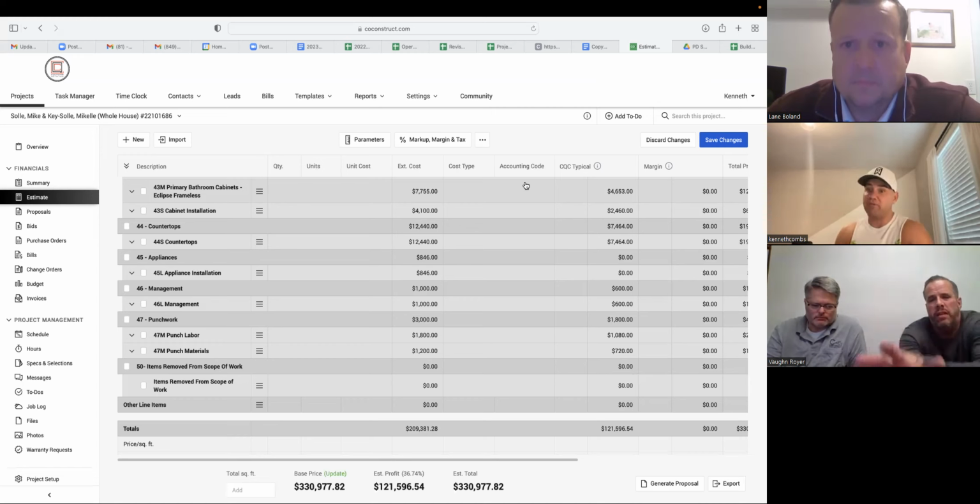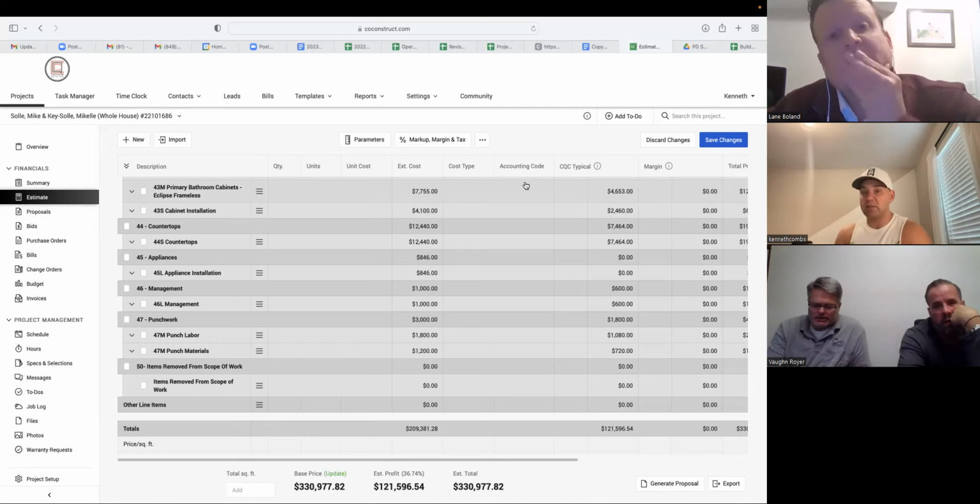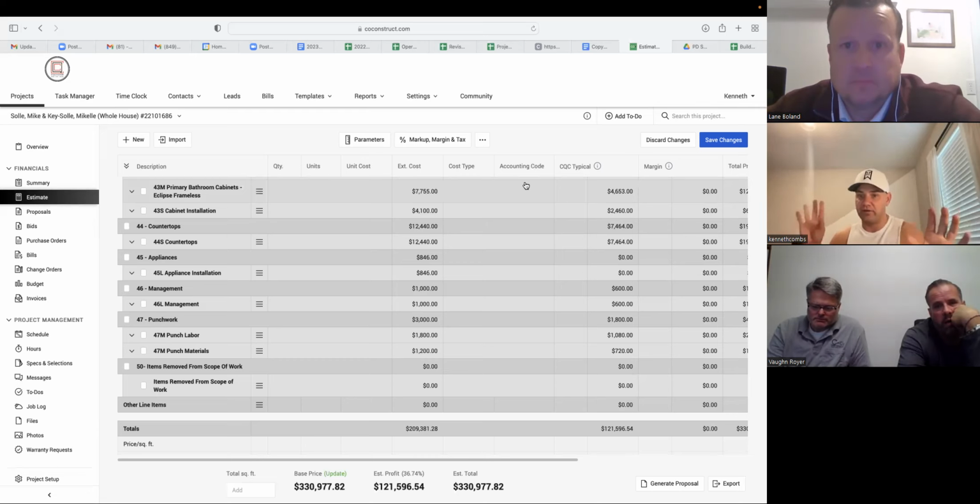No problem. This is for the 50% number you're proposing? Yes. Okay, how is that number generated? Yes, we do tell the client that it's based on this information, but behind the scenes, what is that information based on? A gut feel? It's based on the historical data and the collective knowledge of an architect, project director, and the lead designer, or whoever's the lead design on that.